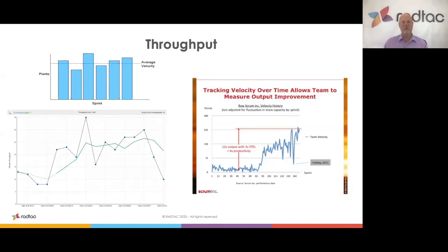be careful, because the team might actually start to size things, taking into account that they believe they can now produce them faster. So in other words, in that situation, what they previously had sized at 13 story points, let's say, they are now sizing at 2 story points. In that situation, the velocity would not go up. All right, so just be careful if you use this. But yeah, tracking velocity over time is generally a good thing to do. But like everything else, be aware of what you're actually measuring.